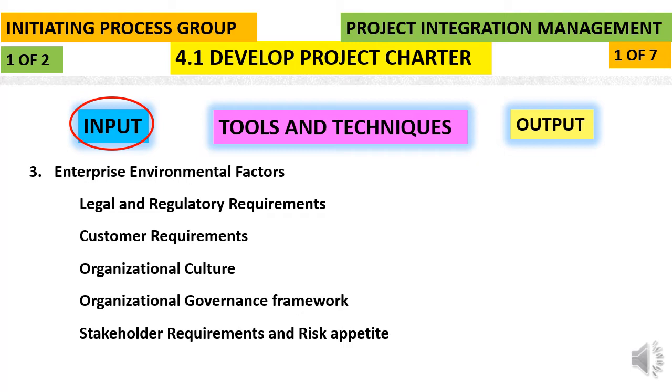So, for example, if you're doing a project and the government stipulates that all the components manufactured for the automotive industry should comply with some standards, or they might say you should not employ a particular resource or a person from a specific country because of various diplomatic and statutory requirements. So that should be considered before we come up with the project charter. So that is about the legal requirements or legal constraints.